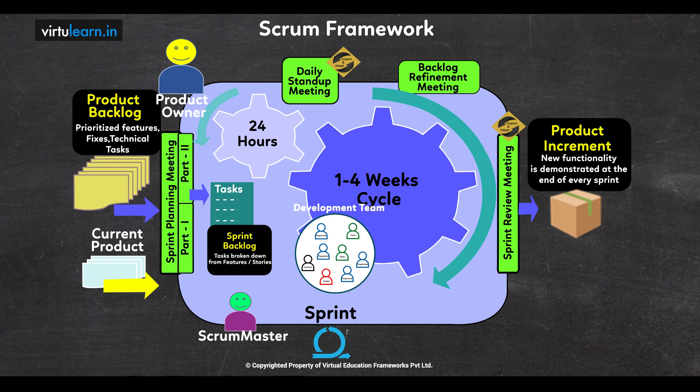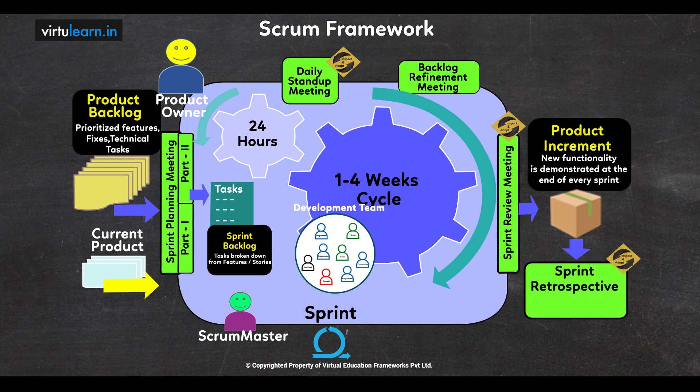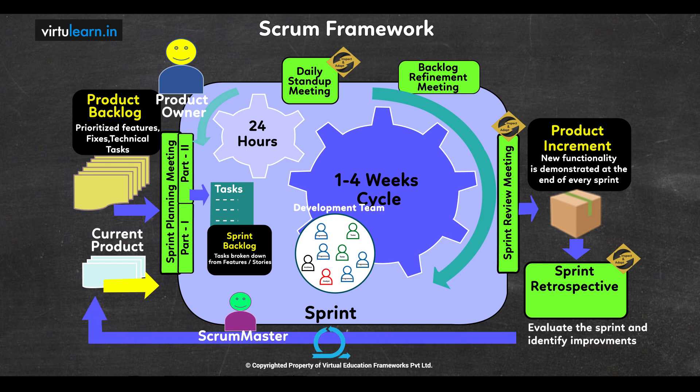At the end of the sprint, the team also conducts a sprint retrospective meeting, which is another inspect and adapt mechanism of the empirical process. The sprint retrospective aims at continuous improvement, or Kaizen, wherein the processes, behaviors, the product, and all related metrics are inspected and adapted. The team ideally celebrates their commitment and the success they achieved during the sprint.